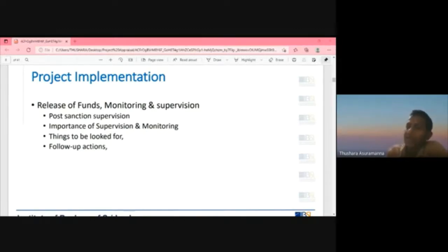Now it goes to, let's say, October, November. If we complete by October, November, we miss the tourist season this year. Then our original plan was to repay the debt with interest from January, capital from next July. Now you can't do that. Then you have to restructure your repayment plan. You get what I'm mentioning, right?